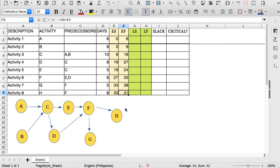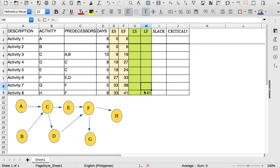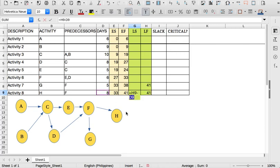In the backward pass, we put first the late finish of the task — we go from back upwards. The latest finish is the maximum early finish of all the tasks, so in this case it's 41. We put the late finish of 41 on the tasks which have no successor. There is no task succeeding H and no task succeeding G, so the late finish of both tasks G and H is 41. The late start is 41 minus the completion days — for H that equals 33, and for G that is 36.